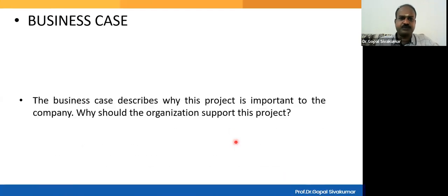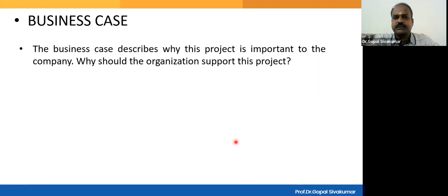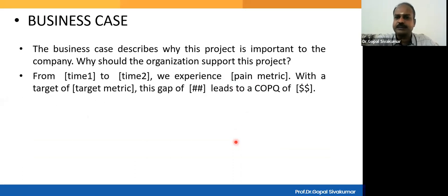So what is a business case? The business case describes why this project is important to the organization. That is why the organization should support your project, right? And this question must be answered, and you can use an appropriate statement. And here is my recommendation: briefly describe the time period, and then what is the pain you are experiencing over that period of time, and when you improve the process with an appropriate target, the gap in your pain metric will lead to what quantum of savings or results your company is going to get.